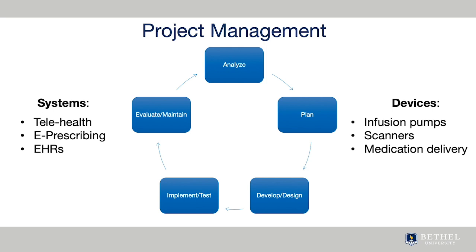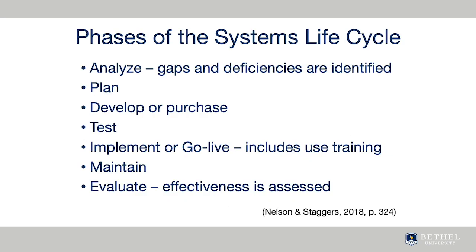The steps of upgrading an information system or technology are similar to the steps of project management. In the analysis phase, deficiencies are noticed and new user requirements are outlined. In the planning and developing phase, the actual design or purchase is done. In the testing phase, the details are worked out. In the implementation phase, the product is installed and the users are trained.